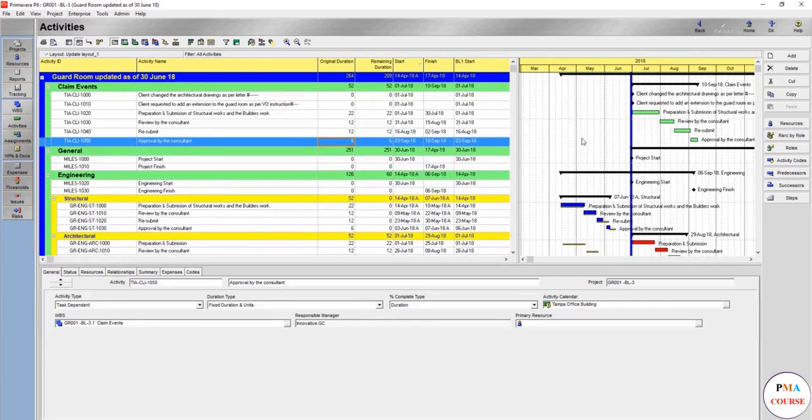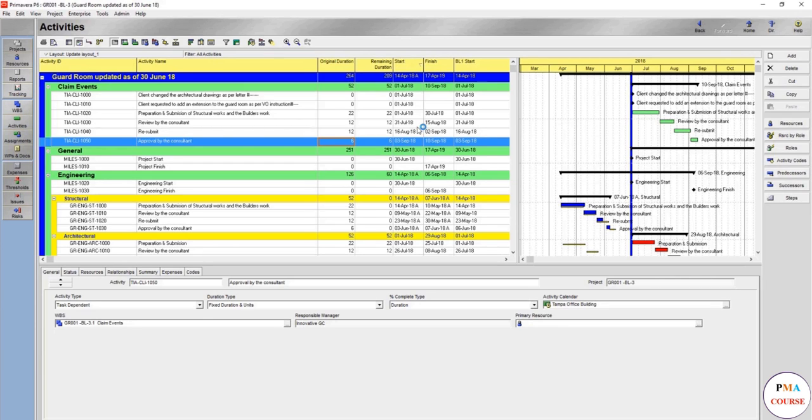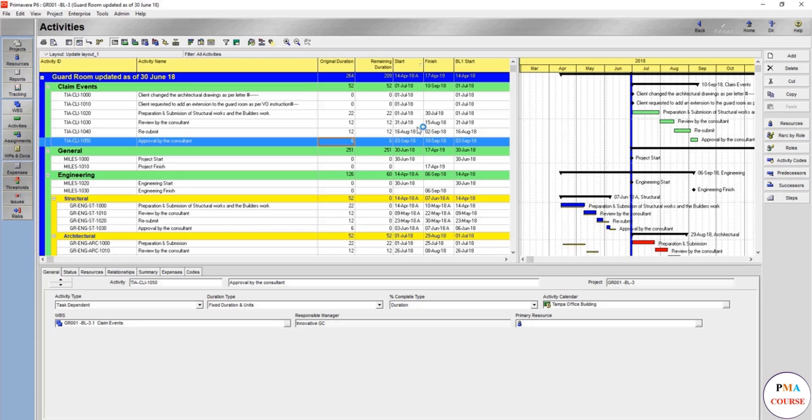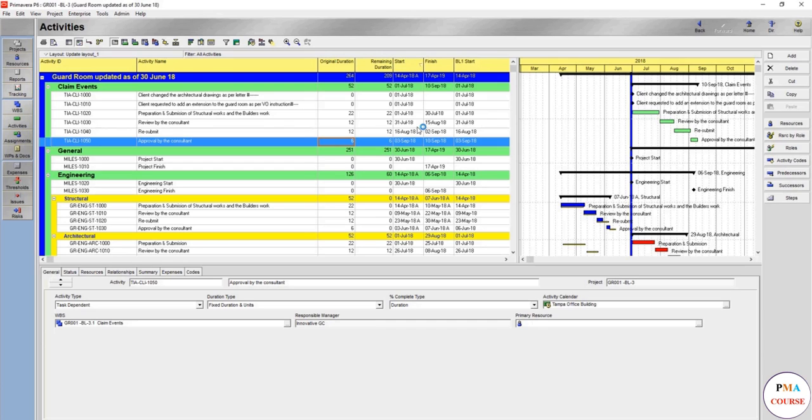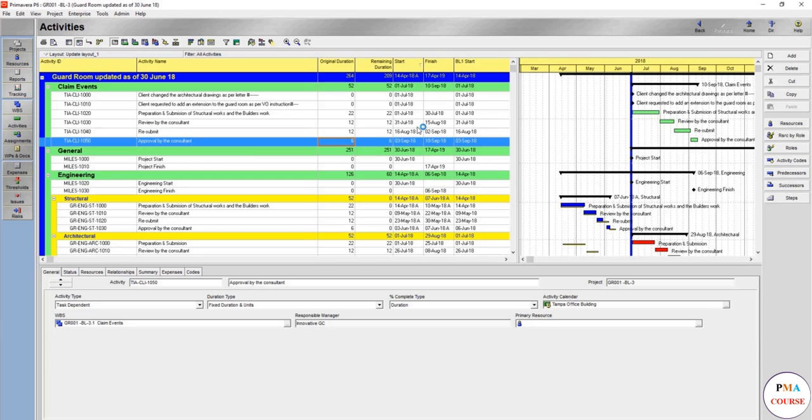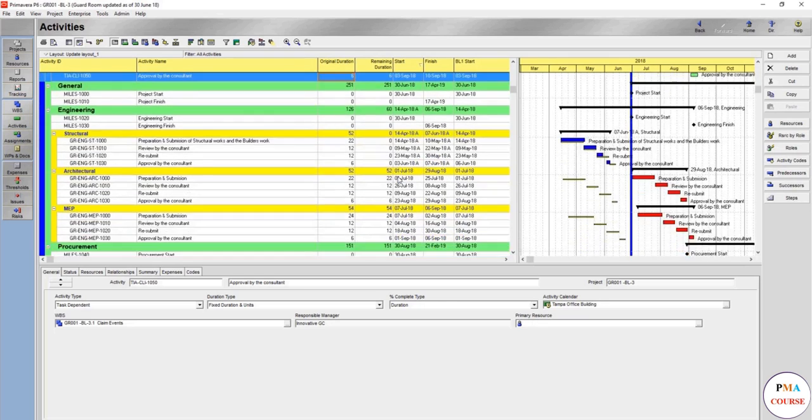It's very debatable, and there should be a lot of documents. But just keep in mind there is different types of claim, which is you can get compensable claim, you can get a non-compensable claim, you can get an extension of time and compensable, none which is excusable and compensable, non-excusable non-compensable, excusable and non-compensable. So now these are the different types. Excusable and compensable, which means that you have the excuse to get delayed because of the client change or whatsoever changes or force majeure, but you don't have the right to claim for money or prolongation costs in such case, which is the money of the overheads and everything for the period that you are going to stay late. It's a quite different subject, but here take a hint.